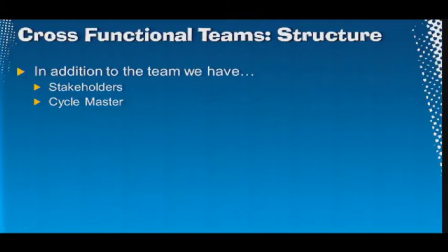And we have a cycle master. And again, this is us trying not to use the word Scrum Master, but it's kind of the same thing if you follow Scrum. It's someone who looks after the running of the team for that cycle. And it's not a role at TradeMe. We're not hiring for a Scrum Master or a Cycle Master. It's just a hat that you might wear from time to time. And so the devs and testers, they'll switch that around to keep themselves fresh and to focus on other things. So one dev might be particularly busy for that cycle, so the Cycle Master role might move to the tester, for example. We switch that around all the time, and they make sure that the cycle runs smoothly.